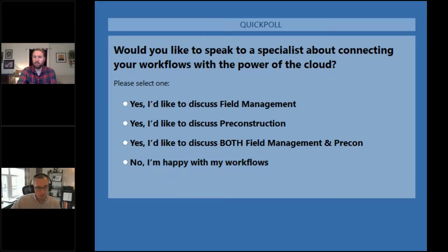There's a question here from Randy about how change management is handled with PCOs being created and communicated from issues. That's one of the powers of this connected platform. Not only do issues span the entire life cycle of a project, but issues can also turn into an RFI. And those same RFIs can then use our cost tool to turn into a PCO.